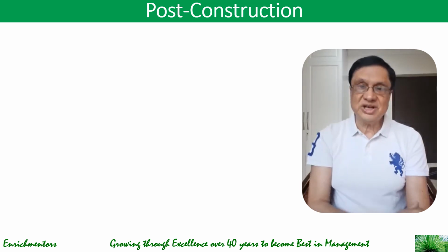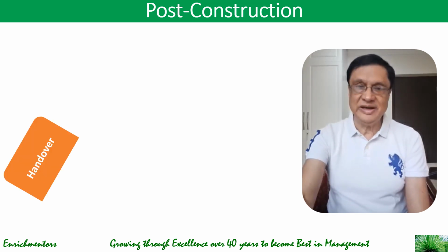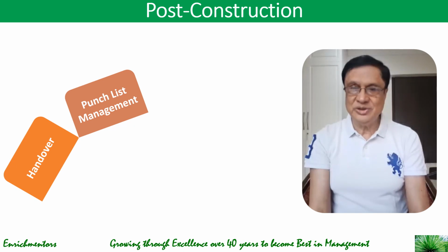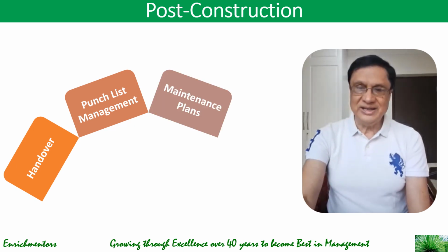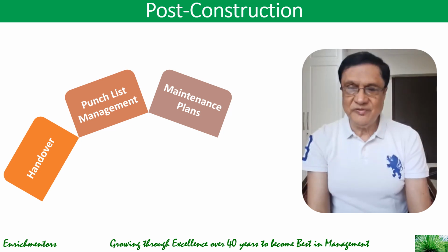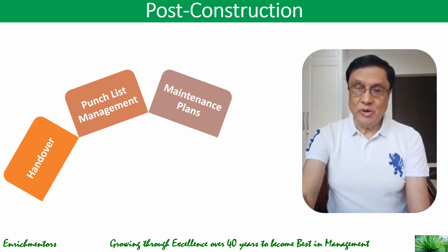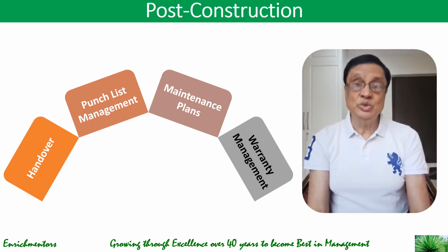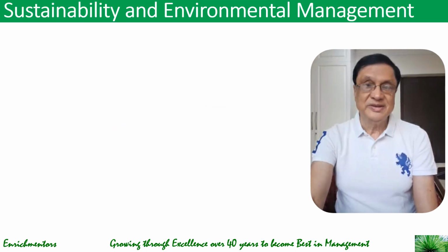And in the post-construction phase, you get into looking at things like handover, ensuring the client receives all required documentation and keys, then punch list management, where you address minor issues or corrections before project closeout, and then provide guidelines for upkeep of the building by giving the maintenance plans. And then there is warranty management, in which you are required to oversee the warranty services and do the follow-up. So that's the post-construction part of construction management.